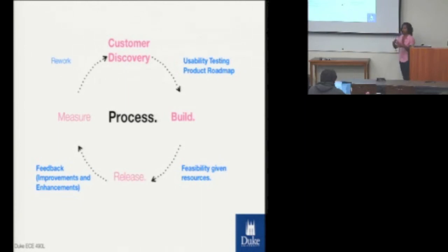Okay? So I know many of you in your roadmaps, right, we talked about this when you got up here and did your exercises, you had sort of month 1, 2, 3, 4, and it had like 6 months. But a lot of times what will happen is either those 6 months will actually be 9 or 12 months of work, or within some of those months you'll have to take some breaks to refine what it is that you did, right, based on the feedback you get from customers. So remember to factor that in as well.